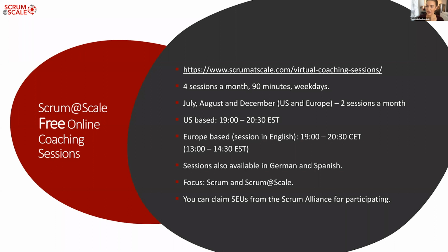Awesome. Got it. An additional one that we had gotten in the chat, what challenges have you seen small companies with 4 to 5 teams on a much smaller scale overcome? As far as impact mapping goes, or just the team in general? I'm assuming impact, goal and prioritization. Well, honestly, it doesn't matter if it's 4 teams or 40 teams. The biggest difficulty is usually ordering, which some people call prioritizing. I avoid the word priority because everybody becomes priority 1 really quickly, right? So I prefer ordering, which goes from 1 to whatever. The biggest difficulty is always ordering.